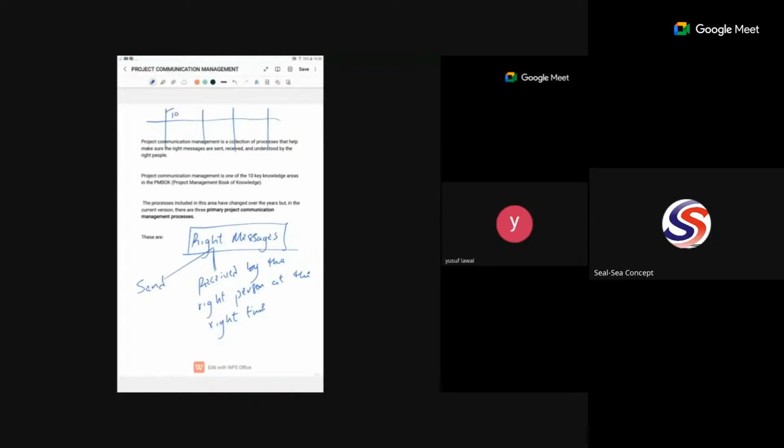So you have the to-do list, doing, and done. You will see various sticky papers plastered here with the stories of what is to be done. These things are taken from the WBS, each unit of work that you need to do. They are put on the to-do list. The project team members can take like 3, if they can be done concurrently, out of the to-do list. It will be under doing, so they work on it. Any one of them they have completed, tested, and had approved by the project owner, they bring to done.